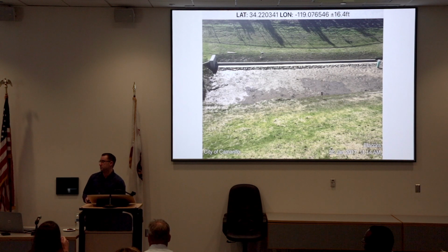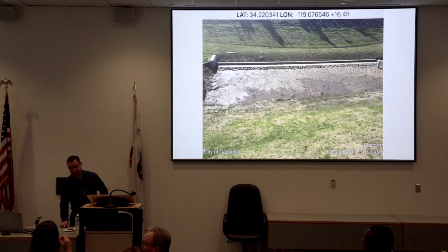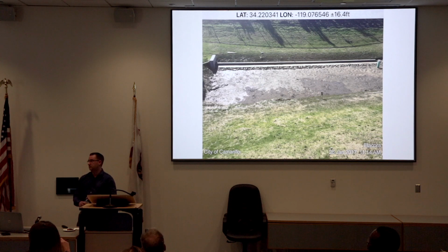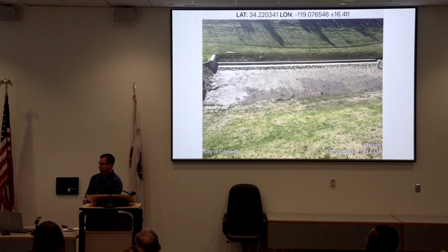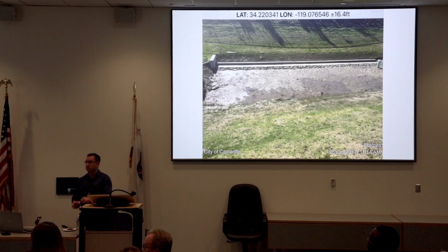Mike, what's your take on this? There's two ways we can do this. As part of occupancy, like what we did, we required these to be offline before we granted the occupancy. Now we're looking at these things as, well, yeah, they failed to implement proper erosion and sediment control. Shame on them. But now we're thinking maybe in the future, because we know that's probably going to happen again.